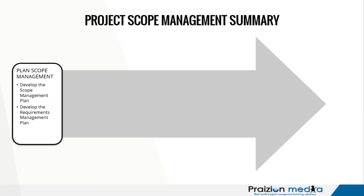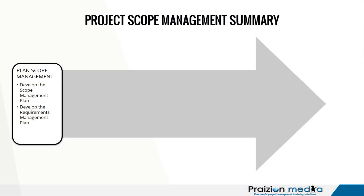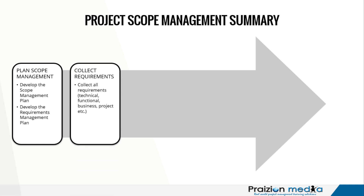Right off the bat, I want you to observe that these are different plans. There are six processes in scope. Take away Plan Scope Management and that leaves you with five. The Scope Management Plan is used to guide the five processes coming after Plan Scope Management. But there is one process that uses a lot more of the Requirements Management Plan, and that process is known as Collect Requirements — that's the second process.